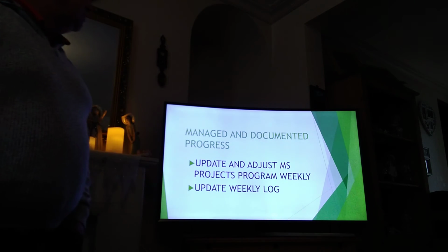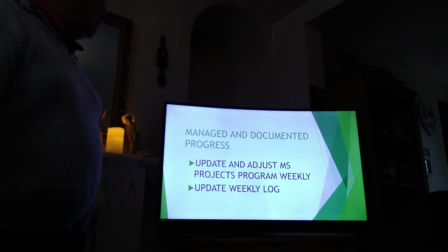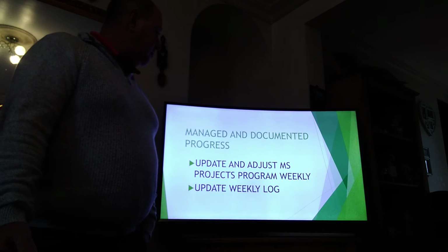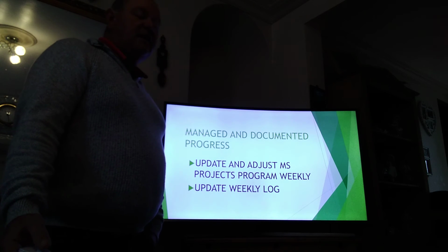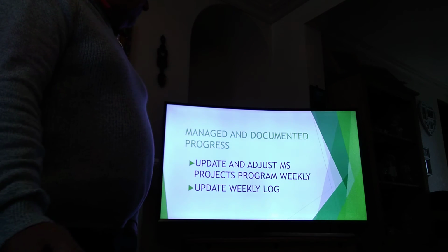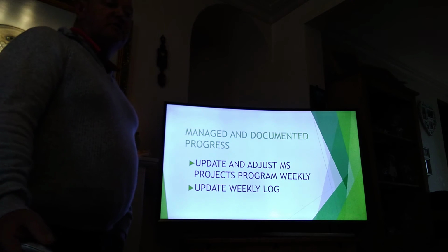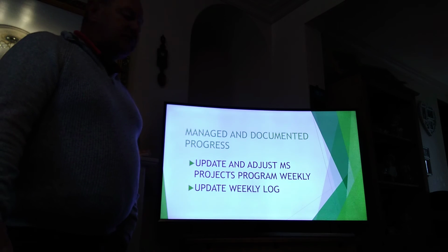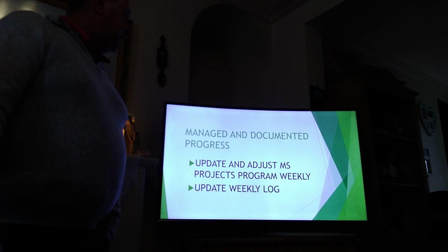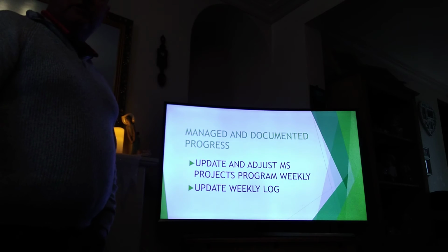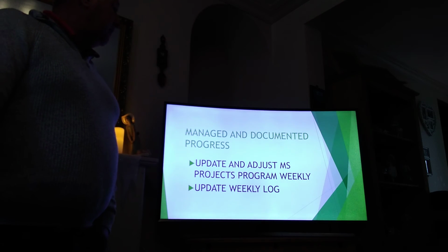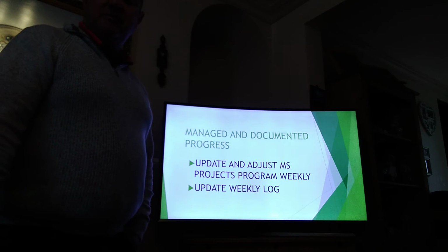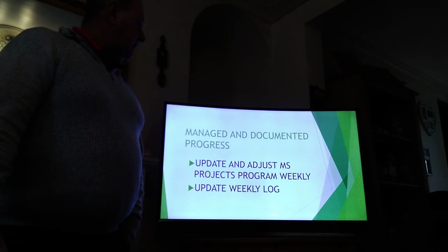The way I managed and documented my progress, as you've seen, I used the Microsoft Project program. Weekly, every Wednesday, I would update the program. I would put in the percentage of each task completed to the date required, and if I could bring anything forward, then I would readjust the program and bring it forward. There were a couple of slight hiccups, and initially writing the program, it all went a bit pear-shaped, but eventually I got there.